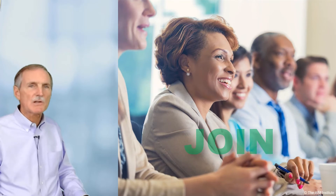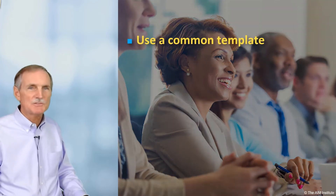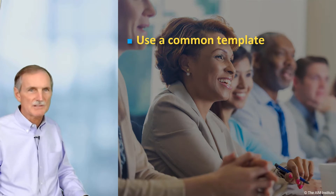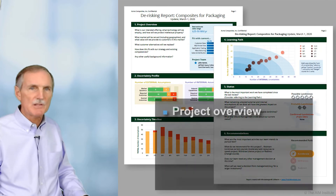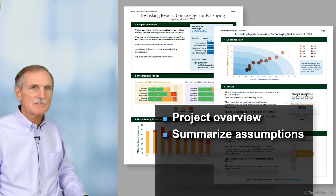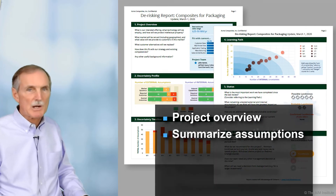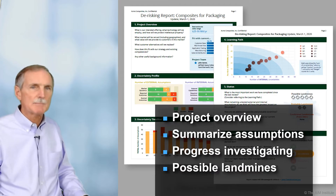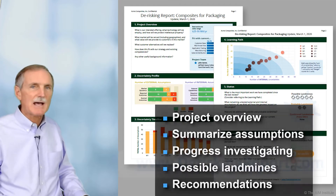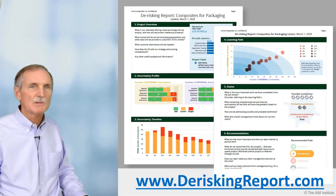Use a common template so management knows you're not hiding something and to help them quickly understand key points. Your template should provide a project overview, summarize assumptions and your progress investigating the critical ones, plus possible landmines and recommendations. You can download this sample at deriskingreport.com.